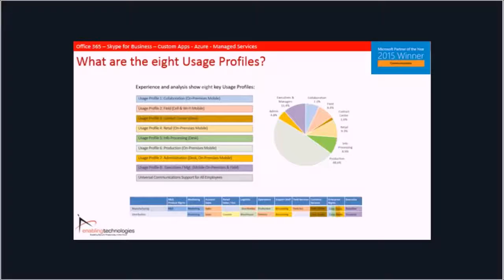You may find that you only have 3 or 4 of these usage profiles. What's important is to start working through that exercise, and then, of course, where you see the color-coded boxes below there, that's where you would drop in the actual titles or roles in your organization, marry them up against these usage profiles, and start to create your blueprint for, again, a lot of things. Which features are in, which features are out. Who are going to be my early adopters or migrators, who aren't.